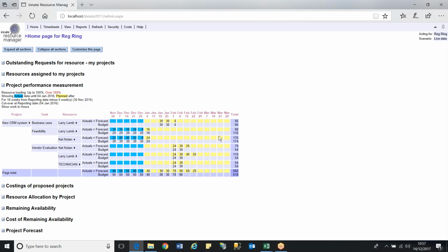And then we're able to see what is the plan to finish this report. What is the work profile that we need to finish this project? The grey line underneath then gives us what was our initial plan or our baseline for this project, giving us the ability to provide on a regular basis what is our current estimate to finish this project.